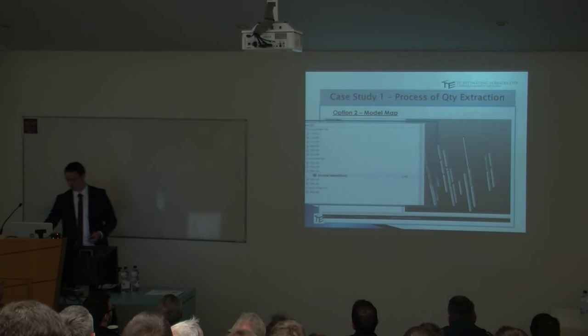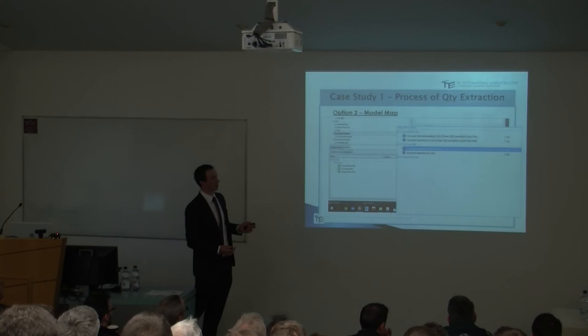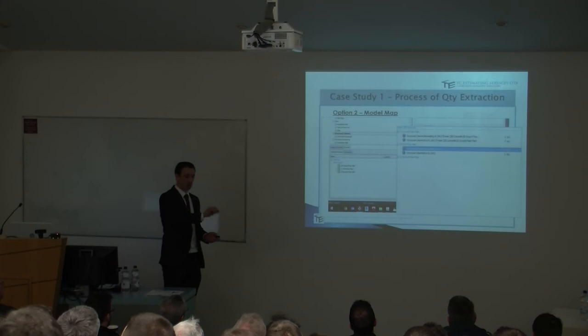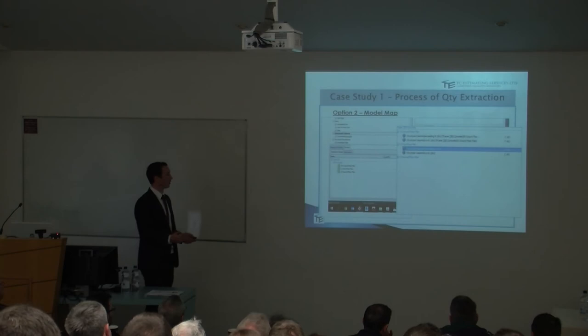Further, I can export it to Excel, sort it, and send it back into the model. Now I have the columns on the ground floor under 0.1 meter squared and over 0.1 meter squared. That means I can literally drag and drop that information into my bill of quantities straight away. I have full traceability of where it came from. I'm able to do my remeasures a lot quicker. I also have the formwork sorted: ground floor, first floor, second floor plan.